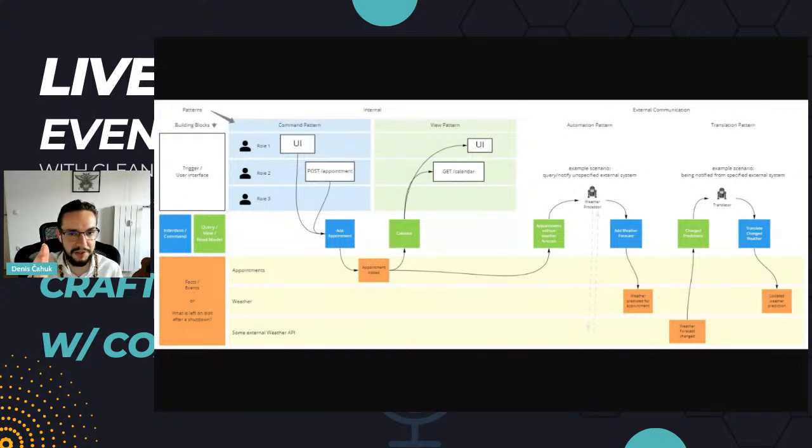Well, okay, if the UI depends on that thing, what is the minimum you need to develop on the backend side to show that other thing? So it's this idea of, if I want to demo this layer, what is the minimum I need to develop on the other layers to show it? So you're traversing this dependency graph, but on the entire project scope, and this is called vertical slices.